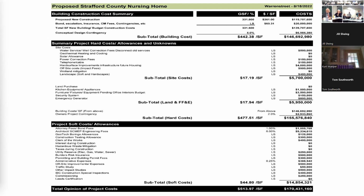There's also the issue with buying things early. You buy appliances, you know, we're gonna buy $100,000 worth of appliances. We're gonna order them day one. They're going to ship, they're gonna go into a warehouse. But they're not actually going to be used until the day you have an occupancy permit, right? 2 years later, the warranties have already run out. So what we do is we negotiate with the vendor, the KitchenAid or GE or whoever it is, and we buy an extended warranty. So they know that equipment is gonna sit stored somewhere. And then the warranty is in place from day of occupancy going forward. So the world is changing, but we're figuring out how to deal with those changes as best we can.